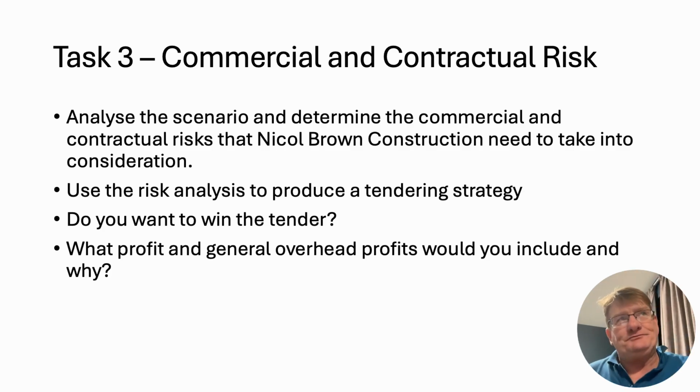And that's why the CIOB recommend that if you're doing closed competitive tendering, you should invite submissions from at least 6 contractors. So let's say that in theory that's worked and you've got 6 submissions. The prices are going to vary. The tender submissions are going to vary, because it depends ultimately on how much they need or want that project. This is quite a nice project. It's quite straightforward. It's very local, and therefore there's an argument.